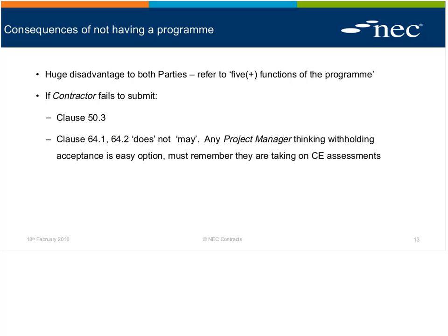This one is less known about, and people like to summarise what the contract says in guides, and they start putting extra words in. The clause does not say the project manager may assess a compensation event if there's no accepted programme. It says the project manager assesses compensation events if, and then there's a fourth bullet point, when assessing the compensation event, the contractor's latest programme submitted for acceptance has been withheld for a reason in the contract.